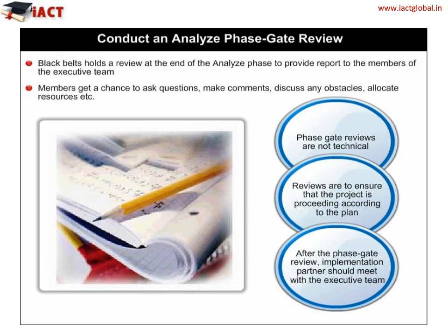Phase gate reviews are not technical. It is assumed that the black belt has worked out any technical problems. They are primarily to ensure that the project is proceeding according to the plan, that the team is meeting the deliverables by the milestones, and that the project is on time and within budget.